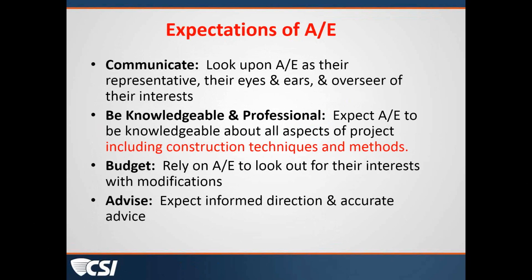And to go along with that, Doug, as you're pointing out, as the construction is continuing, just because you're underway, there is no reason that you have to stop reviewing your documents. Some of the most successful projects I've seen have had construction administration teams on the job site who do coordination of documents throughout the construction. It doesn't stop until the project has been finished. So even if you discover that there's an issue, finding it out as early as you can and sharing that as early as you can is much more beneficial.